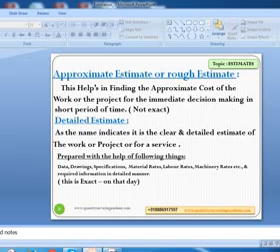So everything will be included there. All the quantities will be taken from the drawing. All the specifications related to the works will be very clearly written. Based on those specifications, the material rates, labor rates, machinery rates, everything will be included in the format and multiplied with the quantity. Then you will get the detailed estimate.